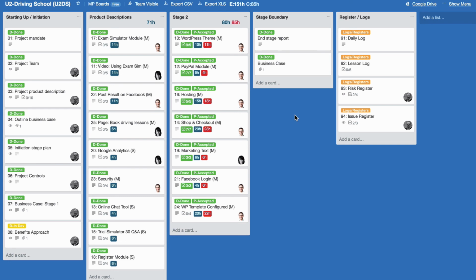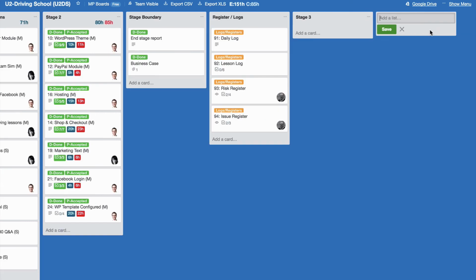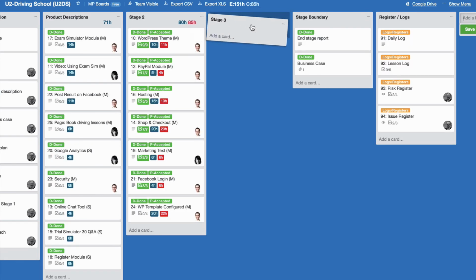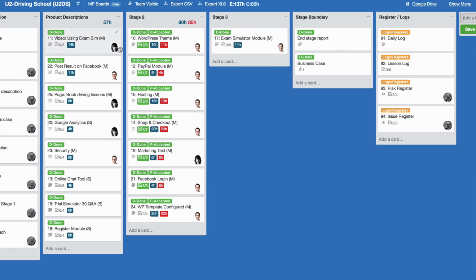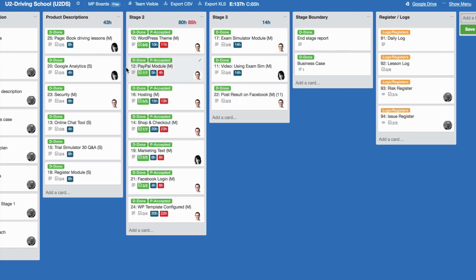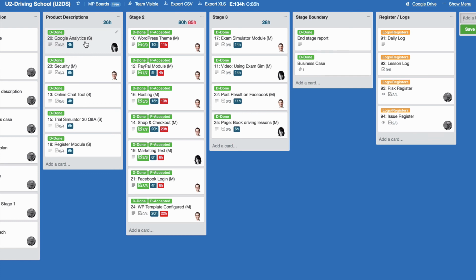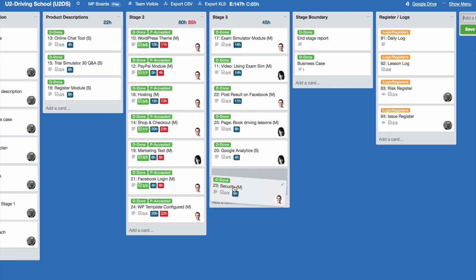So now let's plan stage 3. So I'll create a new list here called stage 3. Let's drag this over here. And I can now drag some items. I've already added the people to the different products. That makes it a bit easier. I can just add them in like so. Okay, and that's a total of 49 hours then for stage 3. All right, and that's basically it.